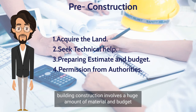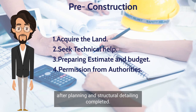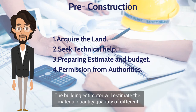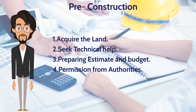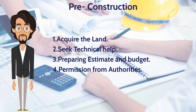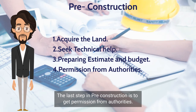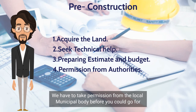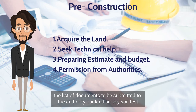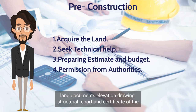The third step is to prepare an estimate and budget. Building construction involves a huge amount of material and budget. After planning and structural detailing are completed, these details are transferred to the building estimator, who estimates material quantities and prepares an abstract sheet showing the cost of construction. The last step in pre-construction is to get permission from authorities — we have to take permission from the local municipal body before going ahead with construction.